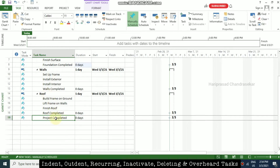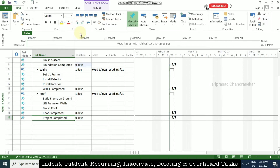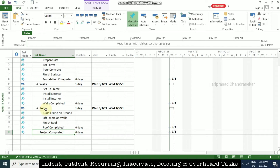If you want to outdent a task, you can just click the cell and then use the 'Out' option. The shortcut for that is Alt+Shift+Left arrow. Using that shortcut, we get 'project completed' outside, so it is now for the whole project and not under the roof summary.